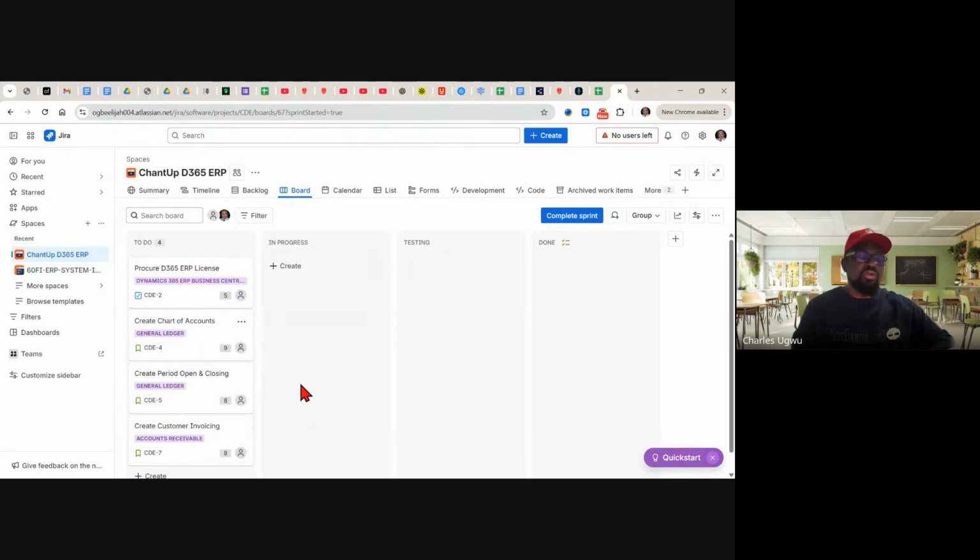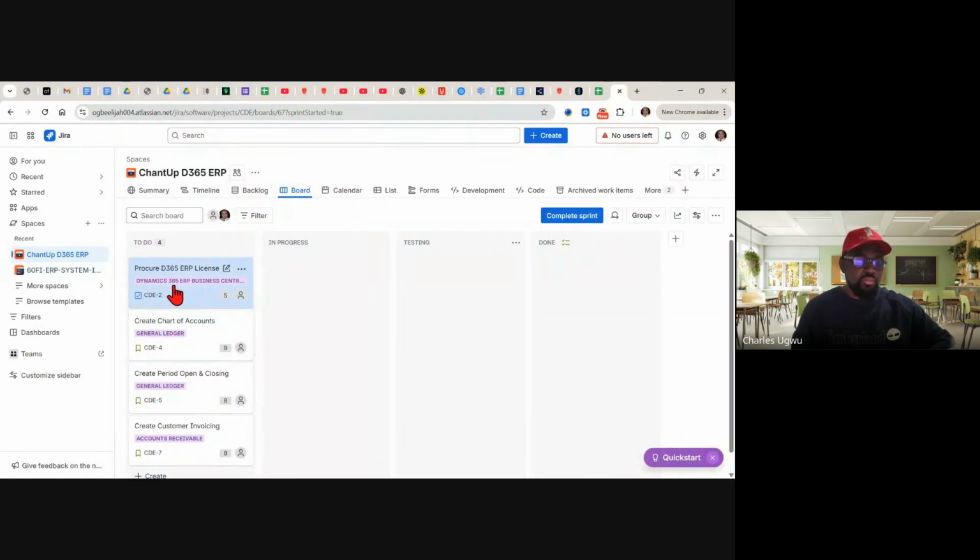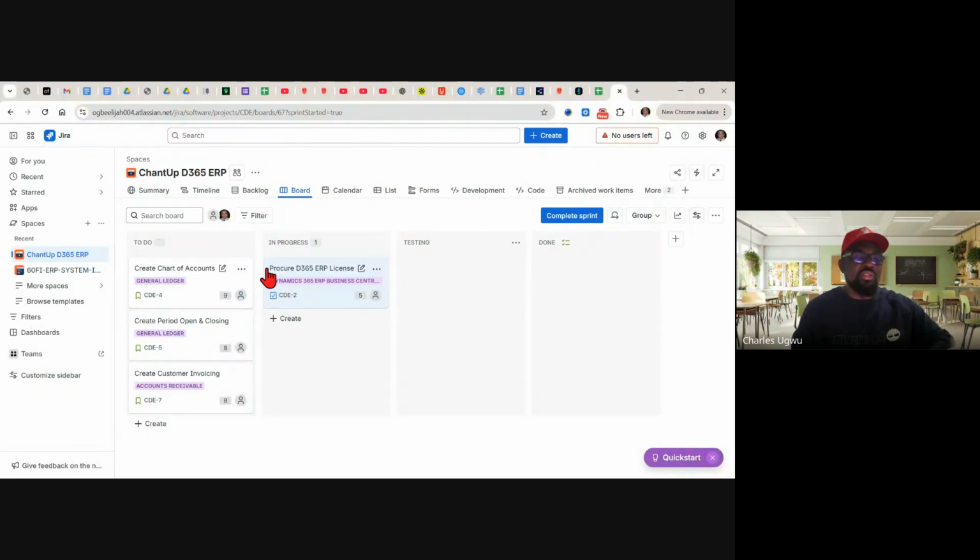And within that 2 weeks, we're going to be having what we call the daily stand-up. Every day, the team will come together before they start work, maybe in the morning for 15 minutes to inspect and adapt. Everybody has to come and talk about what they've done, what their challenges are, and what they are planning to do, every day till the 2 weeks elapse.